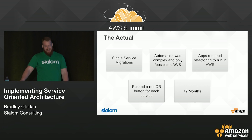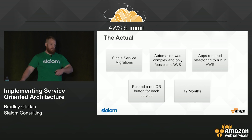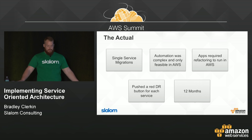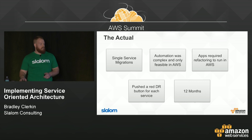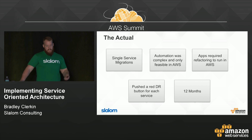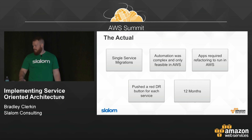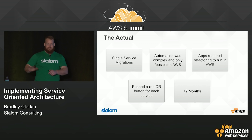What actually happened? None of that, really. We talked through the fact that doing one big migration for all 25 services — each with anywhere between 20 and 30 databases and applications — was just not feasible. Even with two years of automation, you might never hit that point. What we got down to is: if we focus service by service, run in a hybrid model, enable DR functionality in AWS, and execute that DR plan for a single service, we'd likely be more successful. So rather than one big red button, the CIO had about 30 small red buttons.